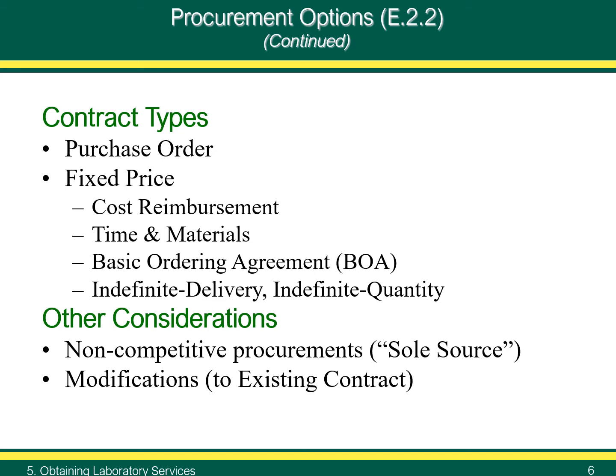The contract modification may be unilaterally imposed by government or bilaterally agreed upon by both parties. The government, however, always reserves the right to modify the contract unilaterally. If the modifications change the price, the contractor may seek fair and equitable adjustments in price.